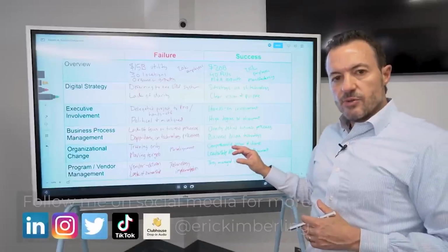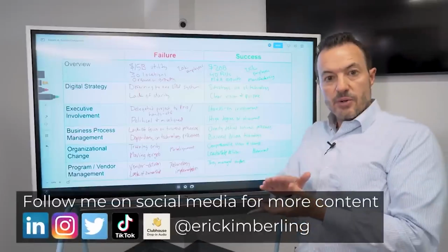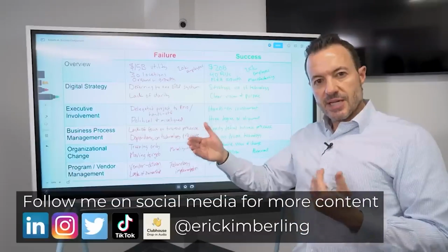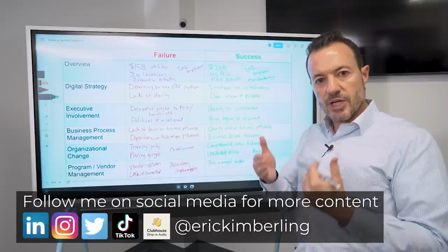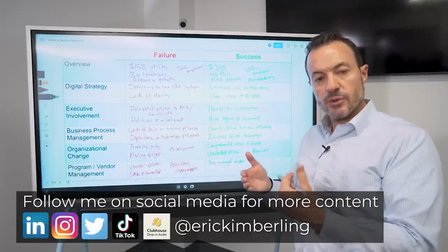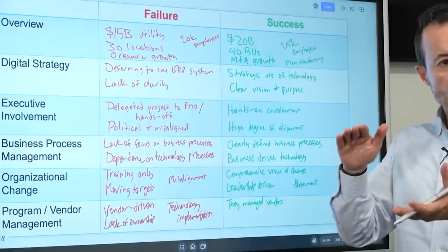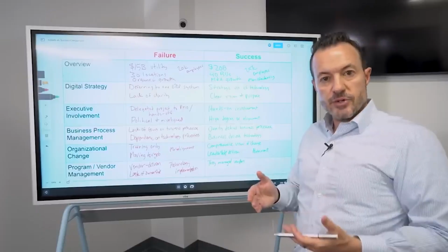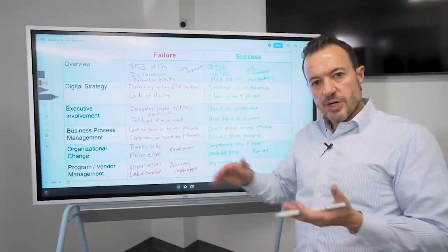In fact, just to give you a quick example, this organization here decided that they wanted to slow down the project and extend the timeline, not because they didn't want to be aggressive, but because they knew that the cultural changes and the operational changes they were trying to go through were going to take more time than the technology. So rather than just going at the same run rate for a longer period, they went to their vendors and said, we are going to throttle back and cut back the monthly run rate and extend the project.